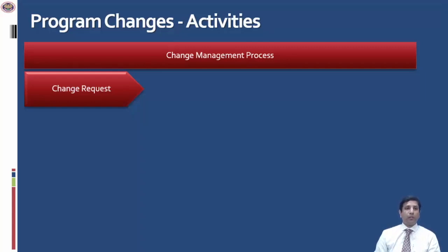Another type of request could be a minor change request where only a color or some kind of a superficial change is required, which is categorized as a minor change. Then there is a major change, which could be either an enhancement or a new module being implemented. Typically, the difference between a major change and minor change is the amount of effort which is required to carry out the change.